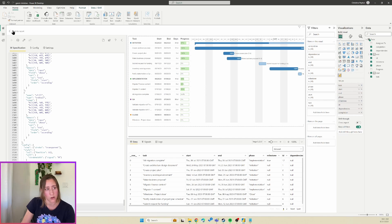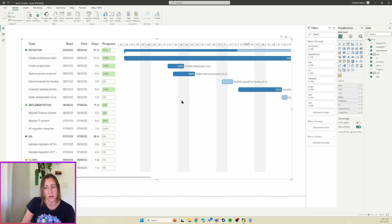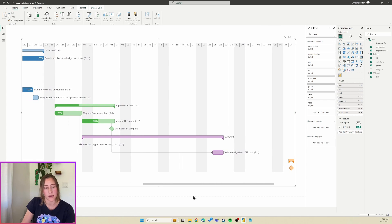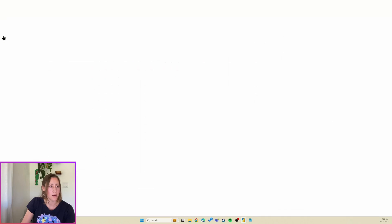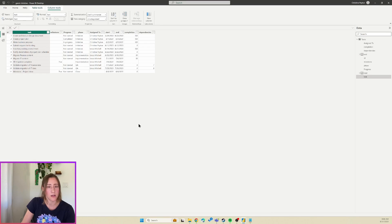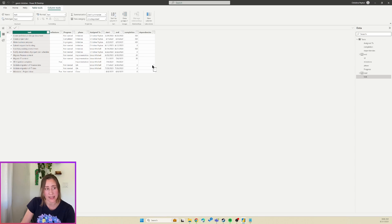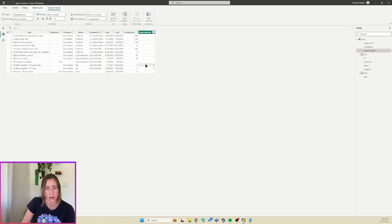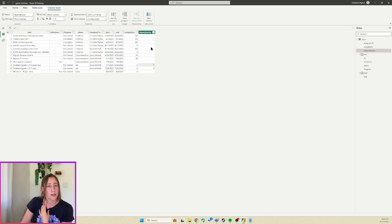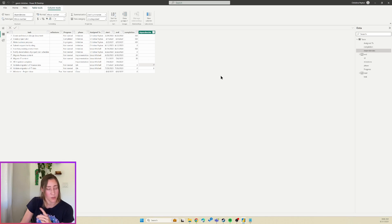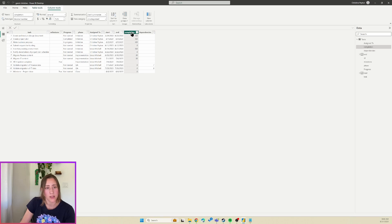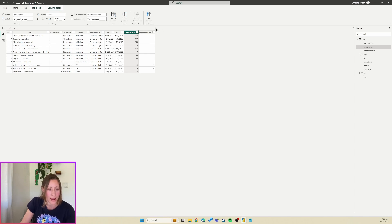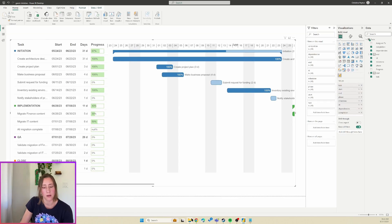And just to go back over a little bit about how the data is formatted, so if I go back over here, you'll see the Dependencies column is a number, and that's the ID of the thing that it is dependent on. So for example, this row number, ID number 9, is dependent on ID number 7. I'm not sure if this will take multiple values or not, it's called Dependencies so one would expect that it takes multiple. I haven't tried it, so maybe we'll try it at the end of this video and see what happens to us. Other thing you want to note is that the completion percentage is a whole number out of 100, it's not out of 1, so make sure to have that in the right format in your data source.